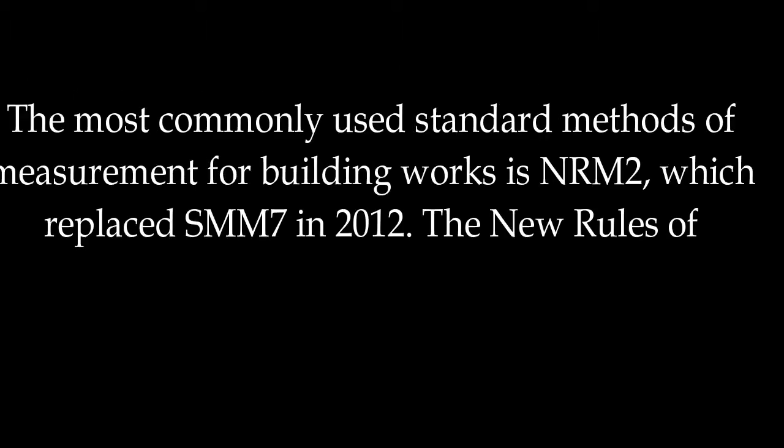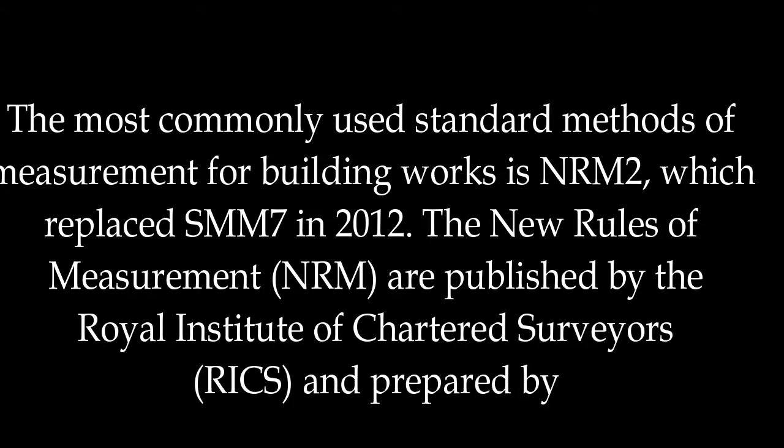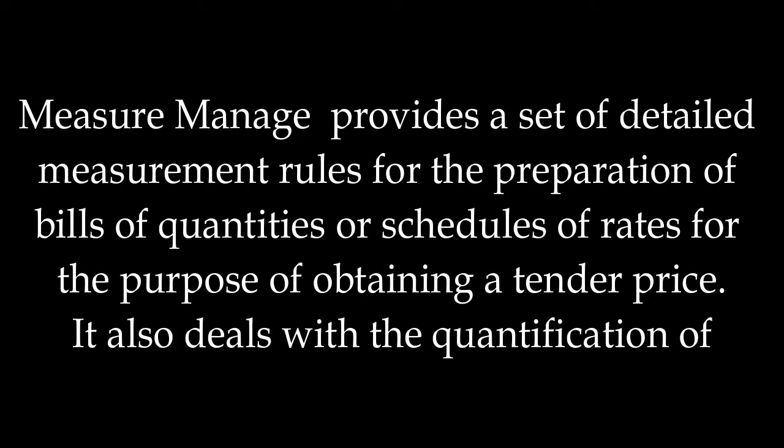The most commonly used standard method of measurement for building works is NRM 2, which replaced SMM 7 in 2012. The New Rules of Measurement, NRM, are published by the Royal Institute of Chartered Surveyors, RICS, and prepared by the Quantity Surveying and Construction Professional Group.